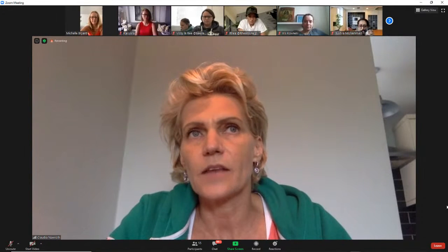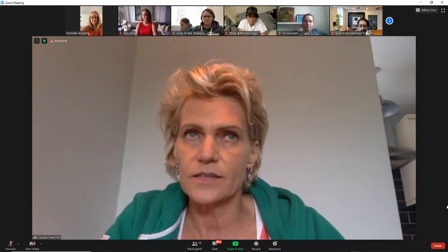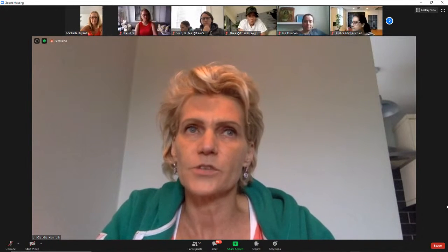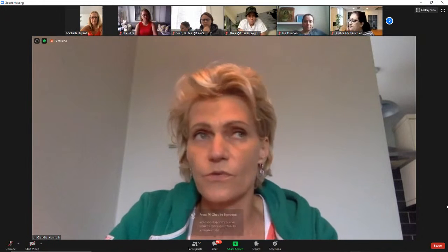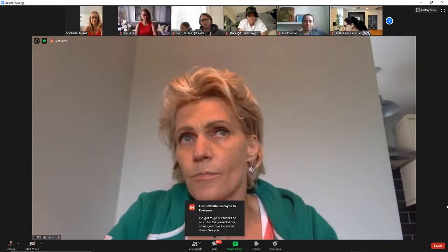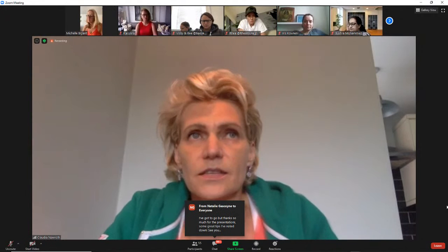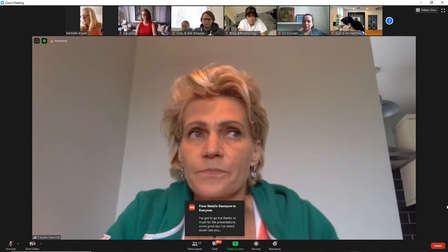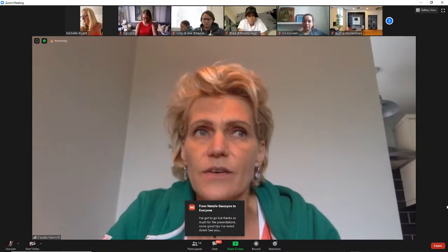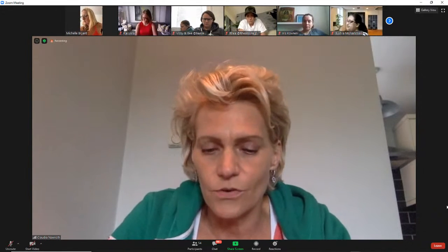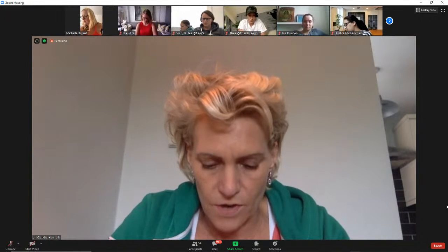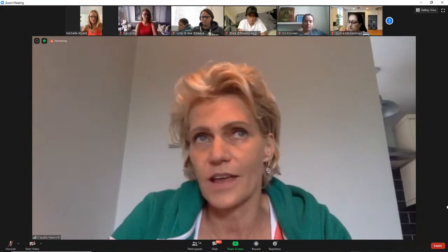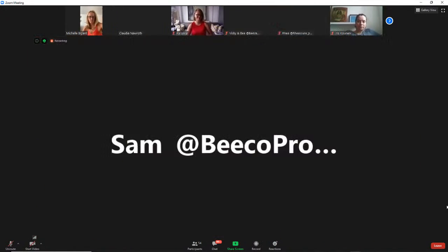If you have a really small project, you still need to pay the architect, for example, which means the percentage of the professional cost might go up. Also things like CIL or Section 106 can vary so much from council to council and area to area. So I would not want to commit to a percentage really. I'm sorry, I don't have a more specific response.